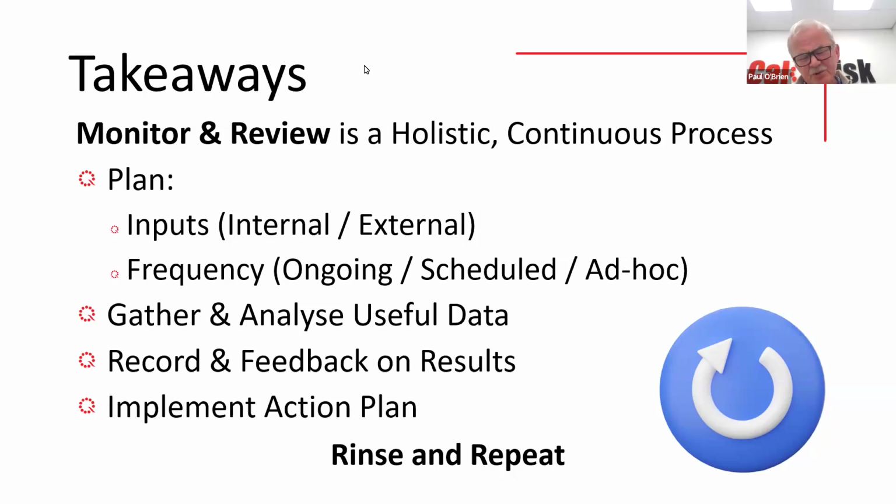I would be inclined to say most risks should be touched for examination in a 3-year period. Again, it depends on the organization, but you do have a look. Remember that the ones that impact the key objectives are frequently monitored by virtue of the fact that there are eyes on them all the time in the organization. You walk through the organization, you'll see things up on the board about loan rates, about ratios, that kind of stuff. That monitoring is happening, and they may trigger a special review of the risk. When the monitoring is visible, they're being monitored frequently. They're probably quarterly, monthly, anything that's reported up.